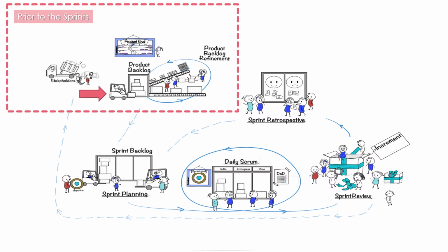Gather user requirements and turn them into deliverable features. These are called stories, the parcels in our diagram. Stories are normally written by the product owner, and the requirements that make up these stories come from the customer. All these stories make up the product backlog.